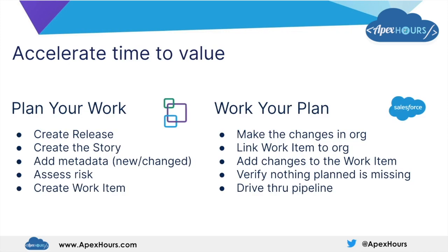There really are two phases. There's planning the work, the business analysis. That's where you're creating a release, developing your user stories, deciding what metadata is part of that user story, assessing the risk of that user story, and then you create a work item, which is the handover from your business analysis piece done inside elements.cloud across to DevOps Center. The work item is that pivotal object.